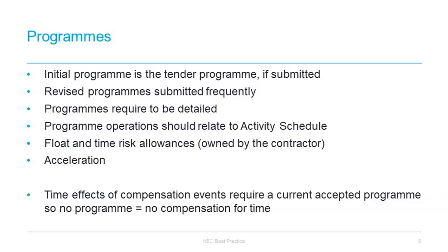Now, at this point, I should mention acceleration. Acceleration has got a very specific meaning in NEC contracts, which is bringing completion or a key date forward. It is different and much narrower than in other standard forms. Acceleration under NEC does not mean speeding up to ensure that a completion date or key date is achieved.